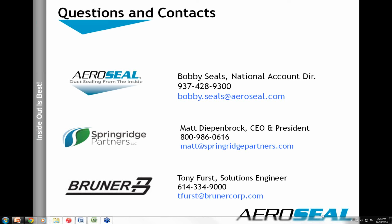But if we have to have more volume or more length, we can actually parallel or double up fan boxes. In some instances, we've actually used the air handlers themselves. We just finished a project up in Rochester, Minnesota that had an 8-foot by 10-foot by 80-foot header section, about 300,000 CFM. And we utilized a couple of those 75 horsepower fans to create the volume and pressure that we needed. Other than that, like Tony, usually the leakage is so great that we'll probably be